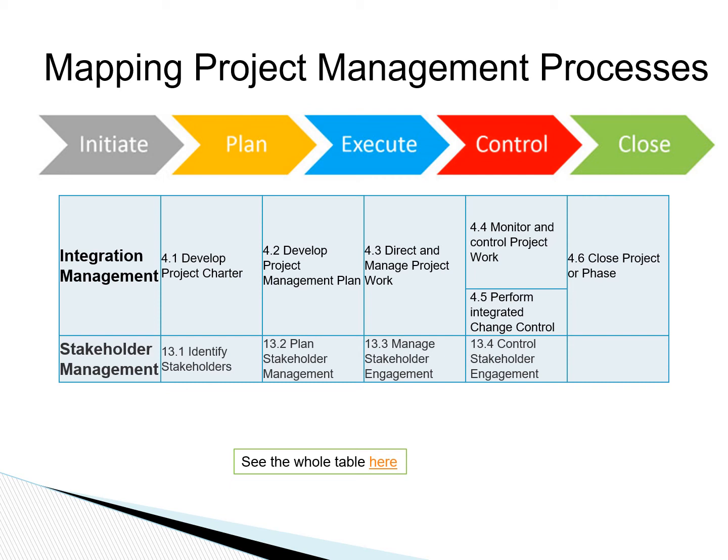Then integration management, just focusing on that, has certain processes associated with it, and the process that is tied to integration management during the initiation phase is, for example, develop project charter. And in the planning stage, the process that ties with integration management is develop project management plan.